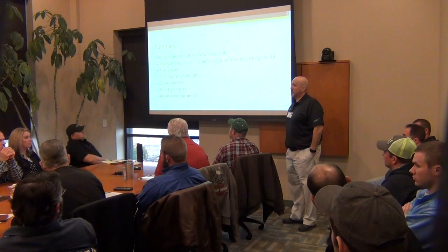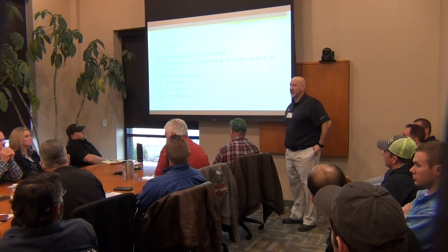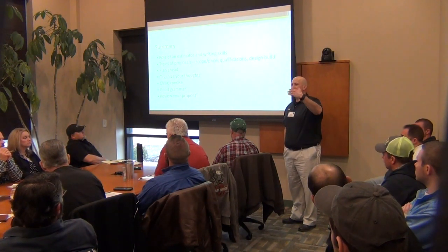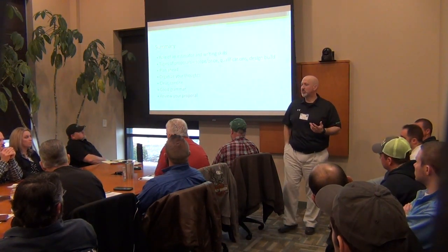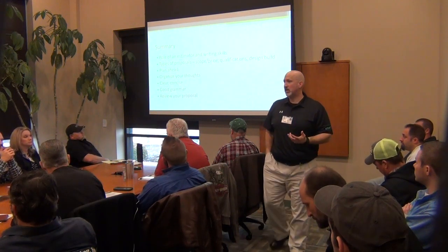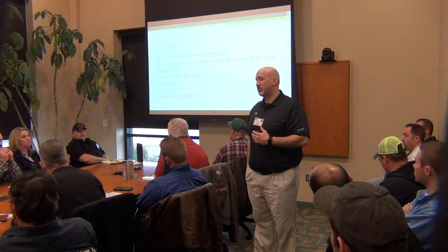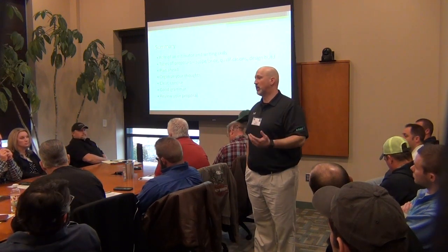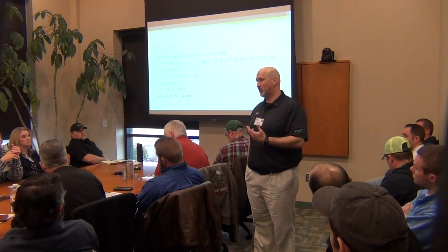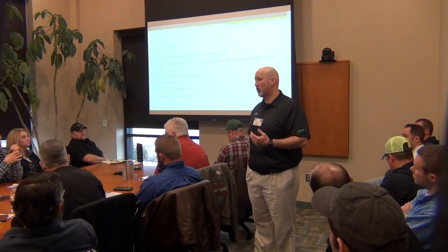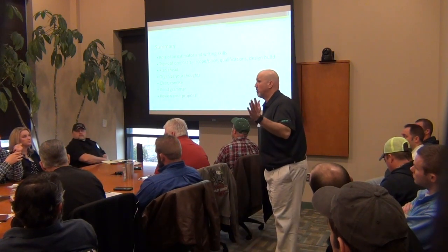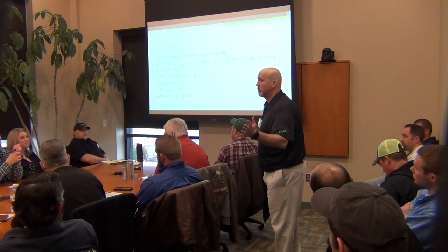But you just have to sit down at the table and say, look guys, I've at least got to have this. There's always give and take. Hopefully you can get to some common ground. But you've got to try to sit down and say, I need this, this, and this in my scope letter. Got to have it. If they say they can't do it, then ask, what assurances are you going to give me that if this and this changes, I'm going to be compensated for it? If they can't answer that question, you may want to walk away from the job.